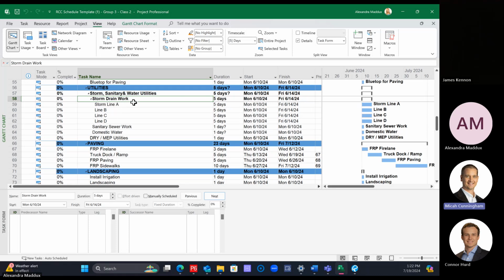We'll take the storm drain work, and do the same for sanitary sewer and domestic water, where you have your wet utilities as a subsection, and then more detailed subsections underneath. So we're taking the set utilities in here and customizing them to match the site work of our project. Is everyone clear on that? Okay, perfect. And everybody has storm drain work with the 3 underneath it.